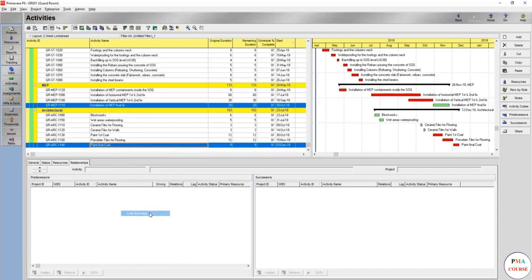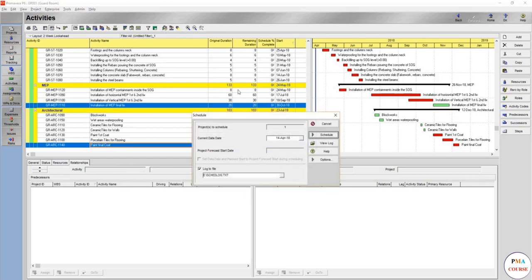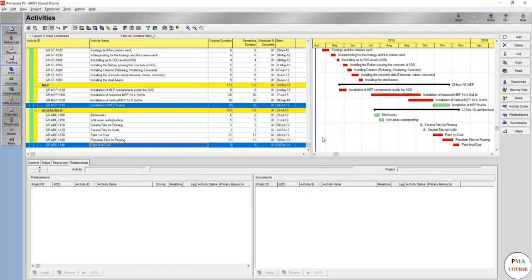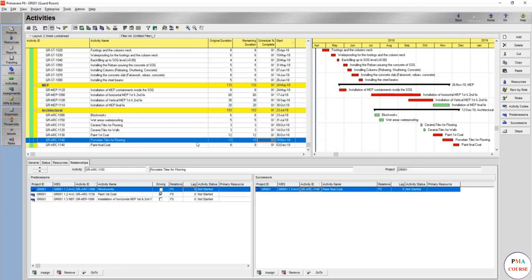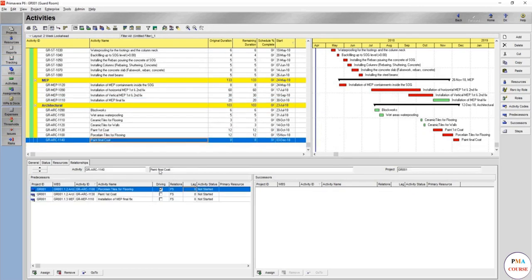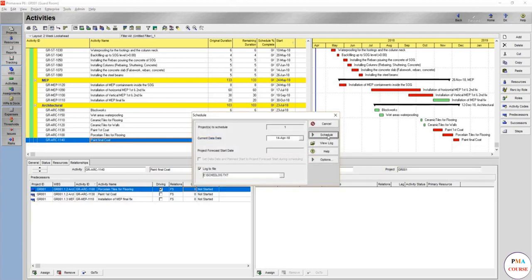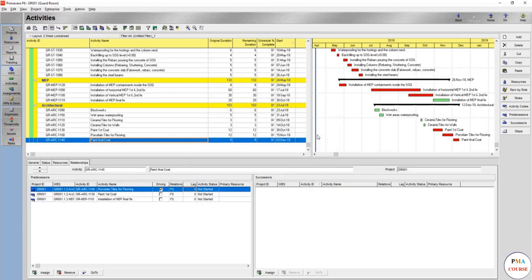Even if it won't be the driving link, you should link it in order to find out later on what's going to happen. So now you did, it's not the driving as you see, but you have just linked it to make sure whenever it's delayed in the update, that's right. Some links you might think are redundant, but they're not actually redundant, because while you're doing the updates, a lot of things should become more and more clear.